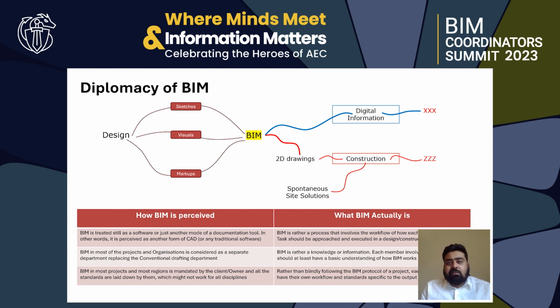The conventional 2D drawings are used by the construction managers and the site team to actually execute the construction. And there is the digital information, which is the BIM model itself, which might be used for as-built or facility management or the operation part of the process. So what we see is that when it's divided into two processes, a lot of the information is duplicated and a lot of information is lost in this process.